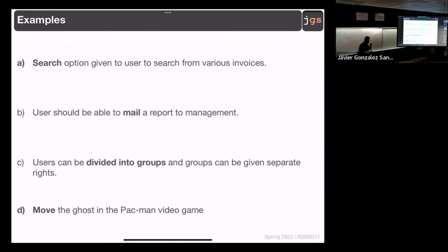Remember that the requirement should be small. Something that I told before in the previous lecture was, okay, if I have something like develop the Pac-Man video game, something that is big, I need to split that big thing into smaller things, right? Something that I need to talk about today: what if it is too small? A requirement cannot be big, and it cannot be too small.